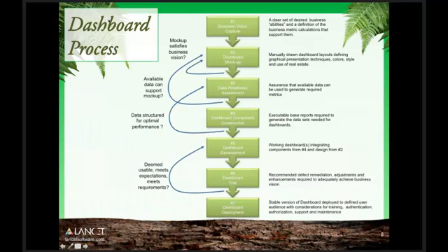So these 4 team members, we want to work in this iterative process, and I just want to go over this quickly. One is capturing the business vision and making sure that you have a clear set of goals. Number 2 would be having your dashboard designer come up with this mock-up. At that point you ask, did this mock-up match the goals? If not, let's reiterate. As soon as it matches the goals, we want to make sure we do a data readiness assessment. That's when your architect's going to make sure that we have the available data. Is that good? No. Maybe we need to redo the mock-up, or maybe we need to tweak the business vision. Hopefully you don't have to do that, but usually you at least have to redo the mock-up.